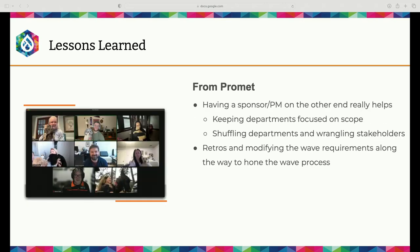From the agency side, some of the main lessons learned for us was that having the sponsor and the PM on the client side, and having one of those two individuals being key decision makers, really helped maintain the efficiency of the project and the expediency. And they were also able to act as advocates within the different departments for moving the project along and making sure that all of the milestones were being met on their side as well as ours.